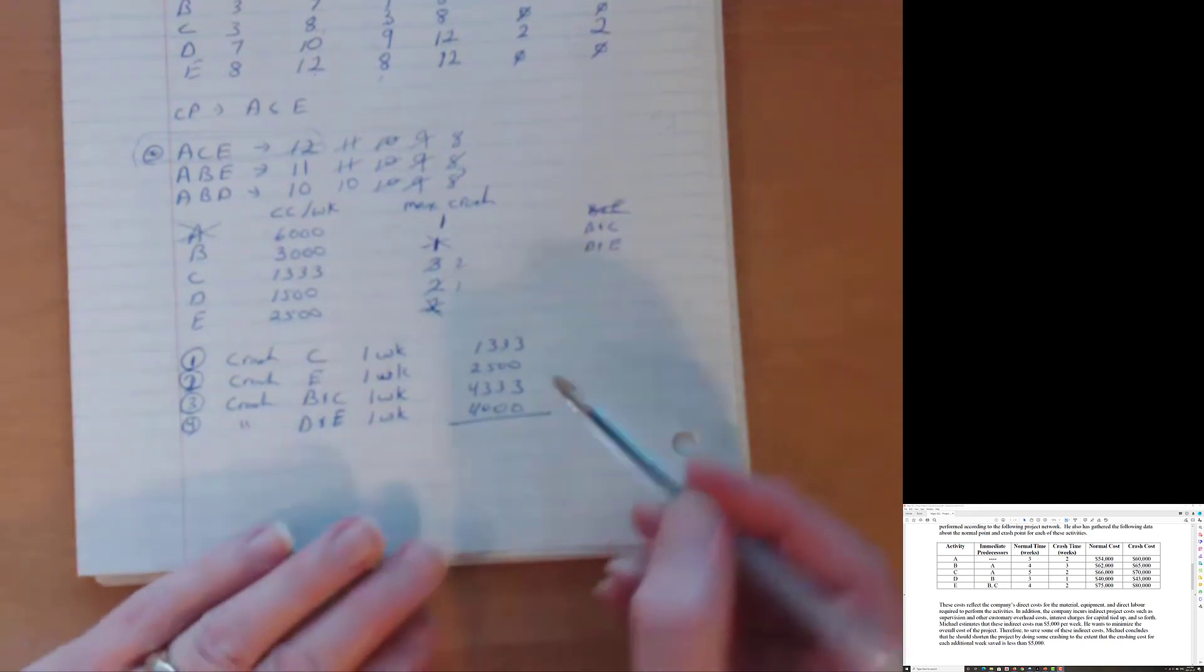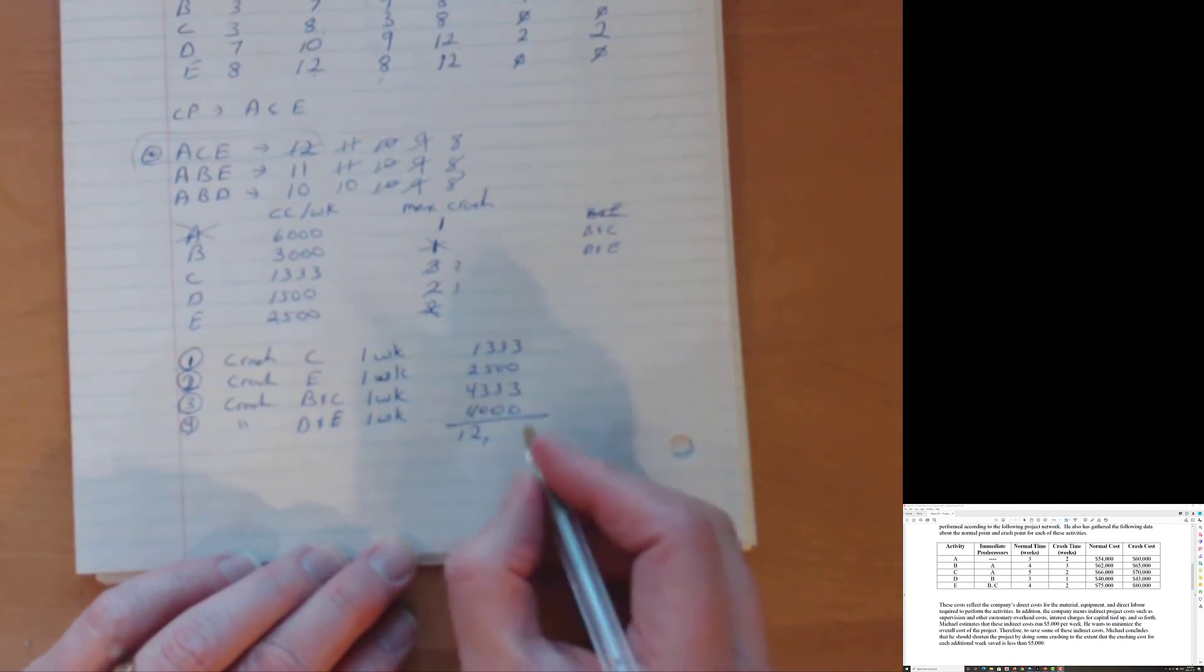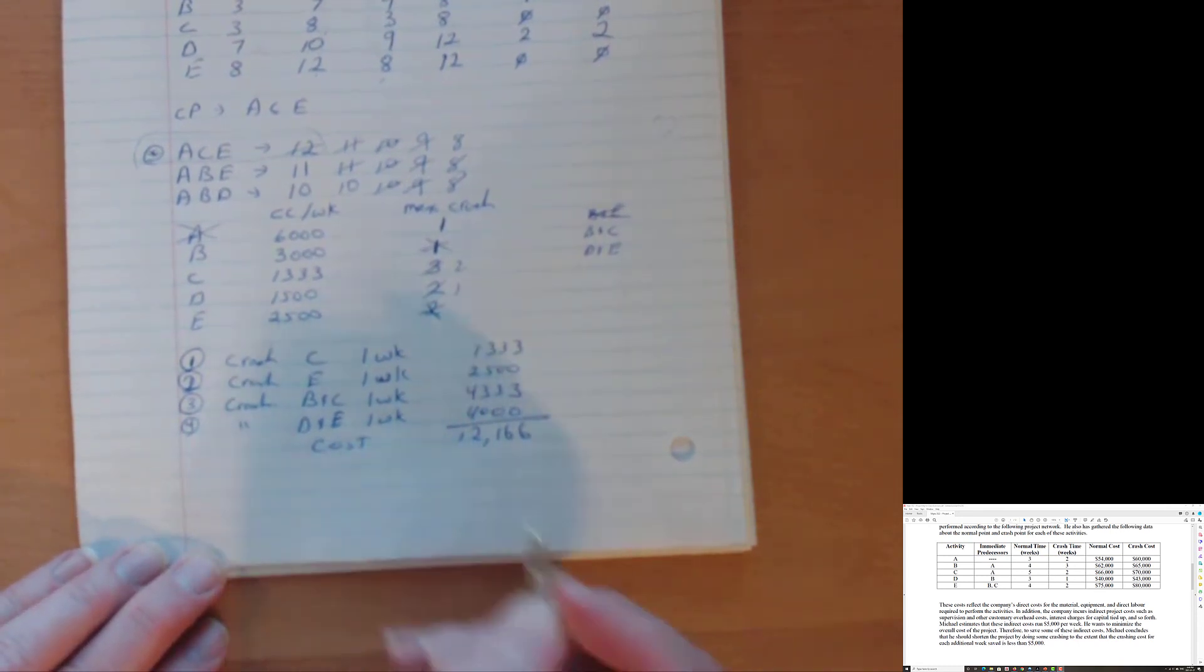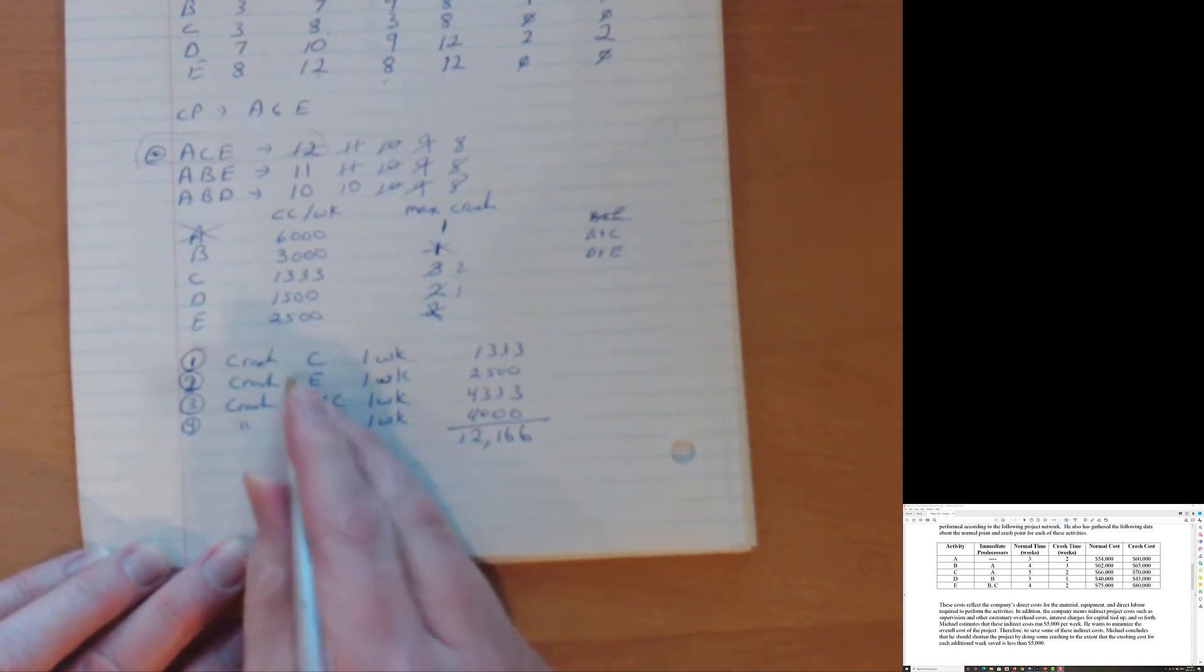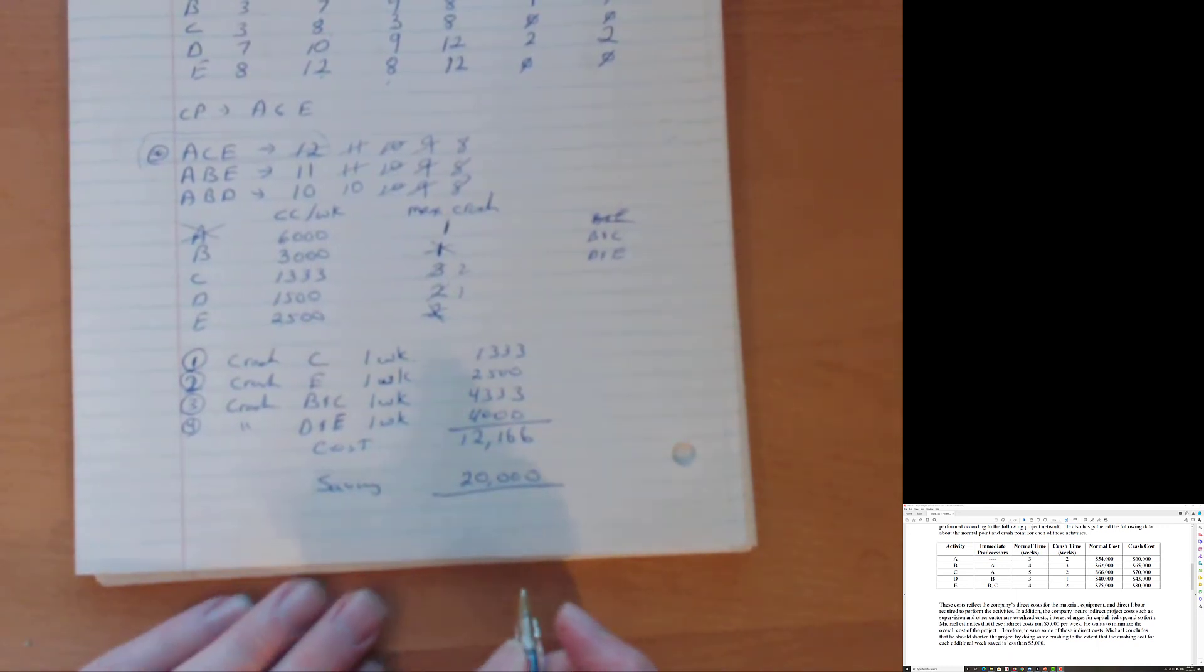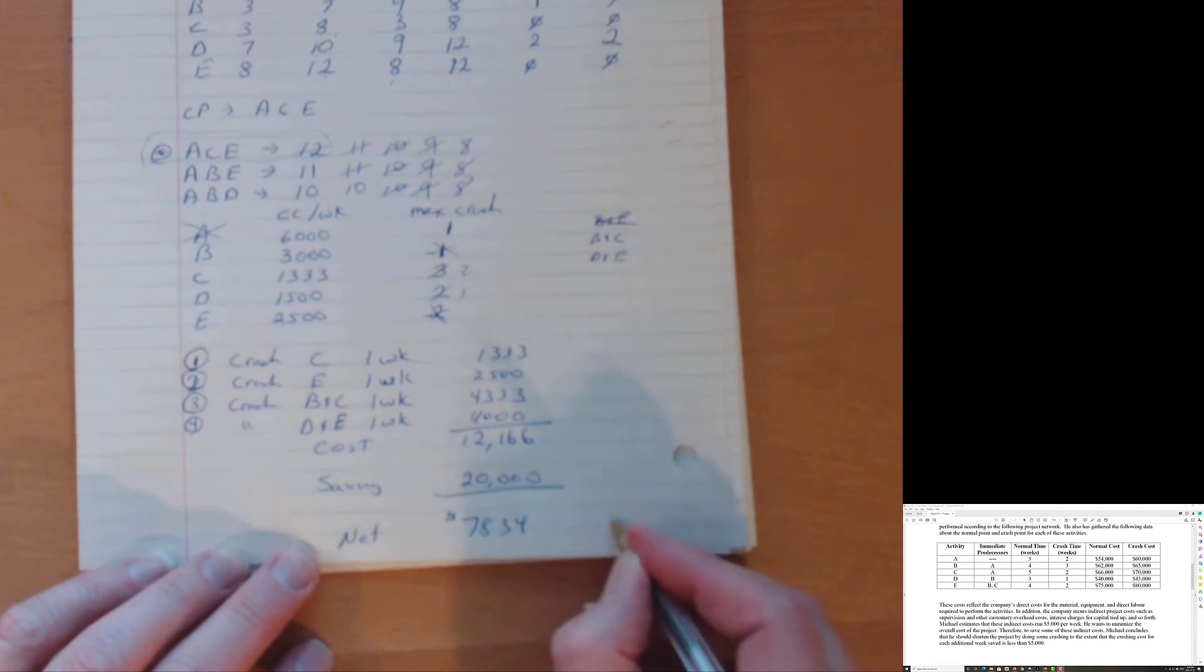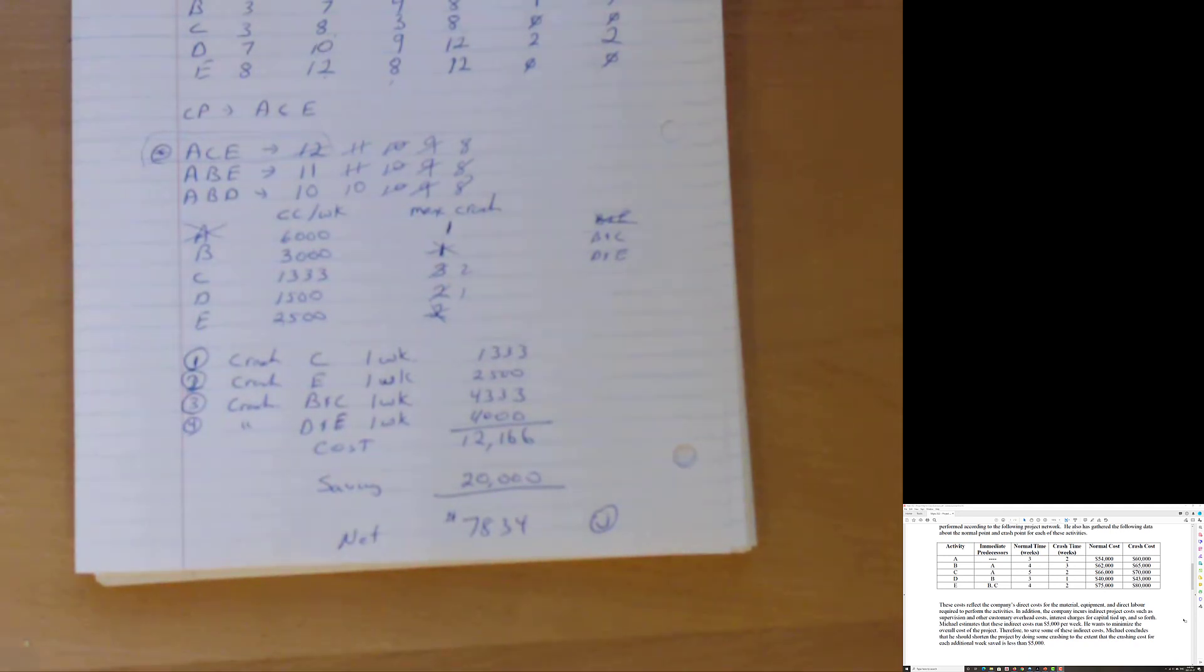So our next step is we could tally up how much money we spent. And so we kind of do the math here, bringing out the calculator, putting on the accounting hat. And we say, okay, we're going to spend about $12,166, a little over $12,000. So that's our cost. Now, how much did we save? Well, we crashed four weeks, saved $5,000 a week. So savings was $20,000, right? Our net improvement, $7,834, right? So crashing four weeks, we spend $12,166 to do that. We save ourselves 20 grand, leaving us $7,834 better off. And we got to really crash a whole lot of projects.